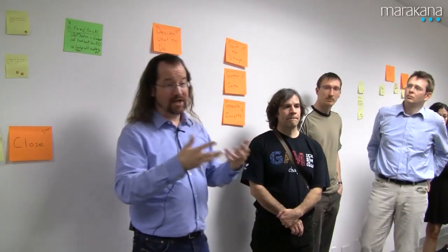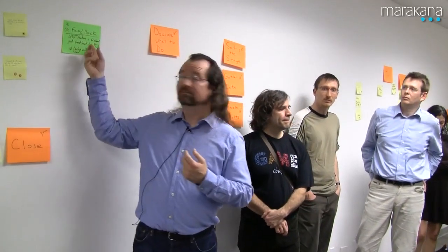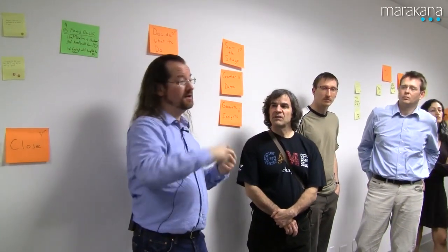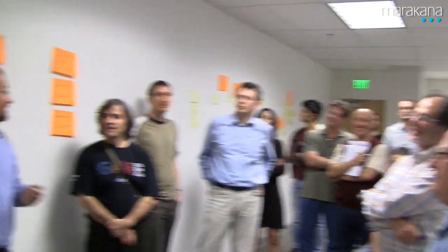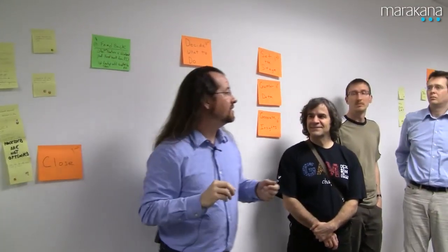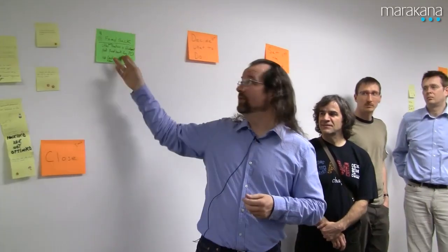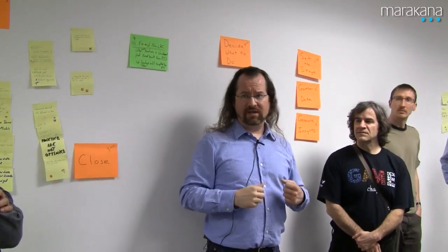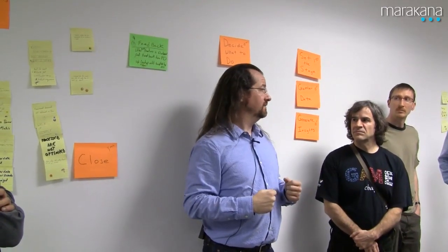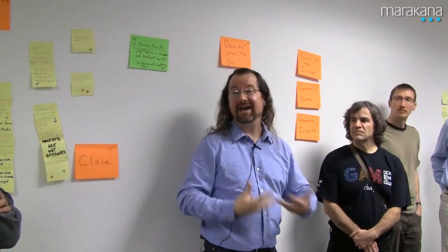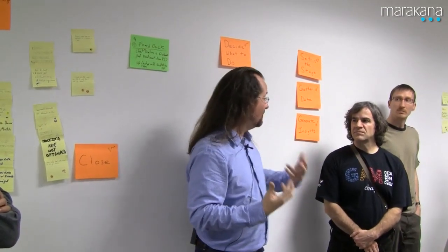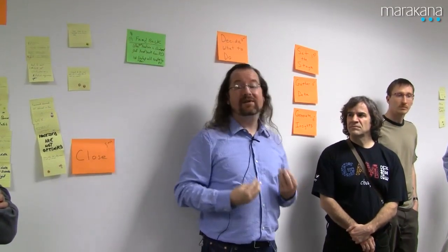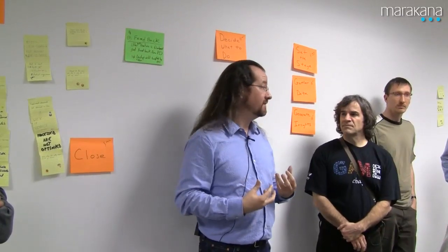So if, for the sake of argument, we have this bad product owner that Alan's going to hunt down and kill, this is something the team can do. So a less useful action item might be require the product owner to be on site every day. Well, unless the team actually has the authority to somehow require that, it's not a very good action item to come out of a retrospective.